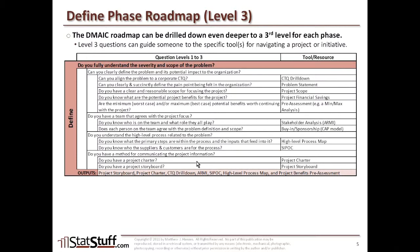Do you have a project charter? If you're not sure what that is or you know you don't have one, refer to the project charter as a tool to help you. And then finally, do you have a project storyboard? If you don't or you're not really sure what that means, refer to the project storyboard as a tool to help you. The bottom line is that we want to answer this top-level question: Do you fully understand the severity and scope of the problem? Let this roadmap be a guide through each of these different layers, pointing you to the different tools that can help you, so you can ultimately answer this question for the Define phase. Once you can answer yes to all these questions, then you're ready to move on to the next phase — the Measure phase.